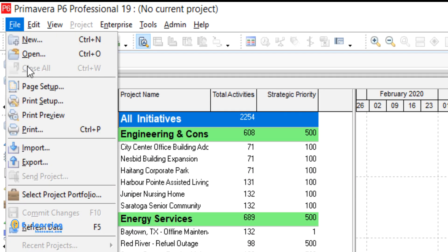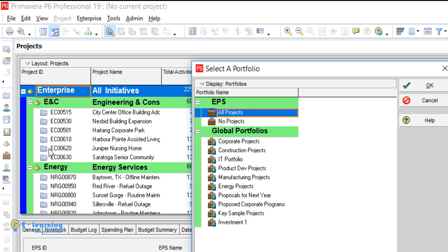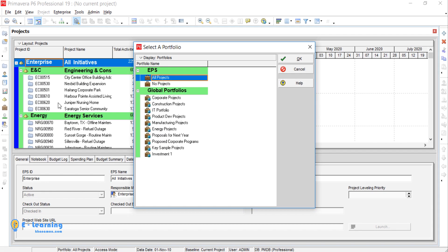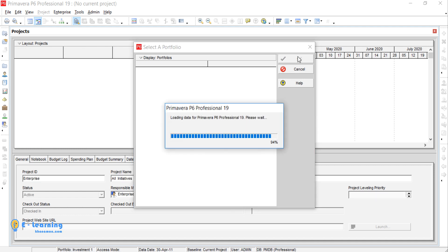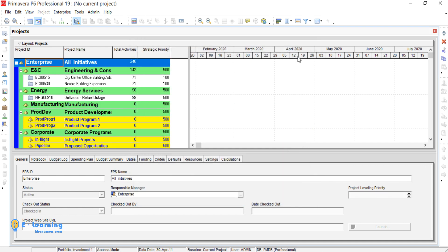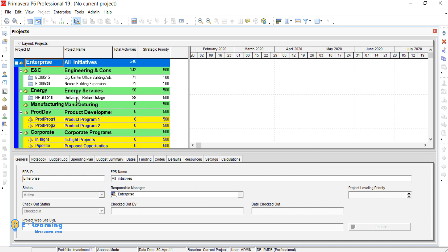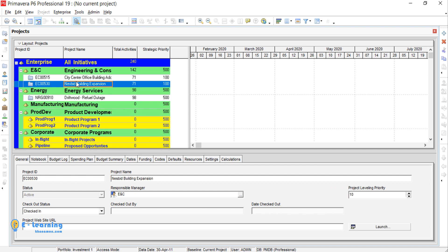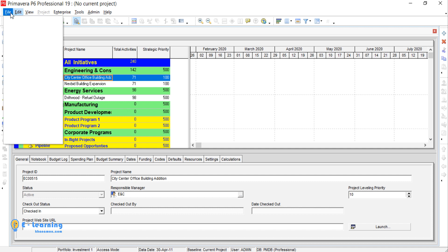By going to File, select Project Portfolio. You see all sample and user-defined portfolios. The Investment portfolio, you can see here. Select and OK. Now you can see just the projects which you have modified in Investment One portfolio.